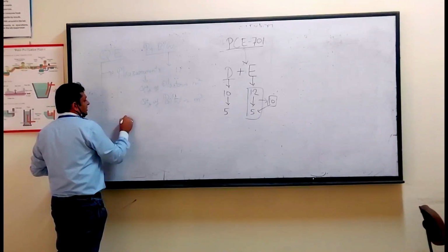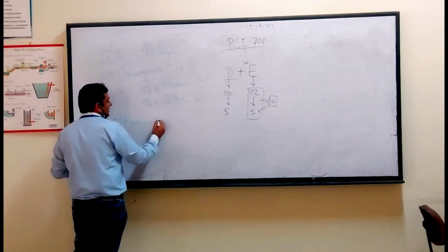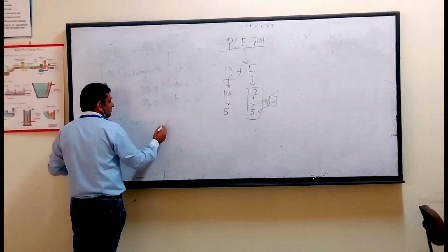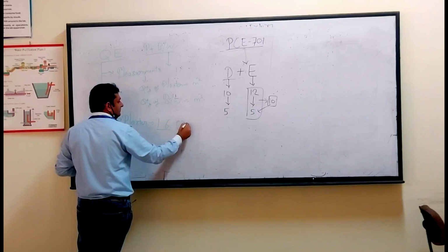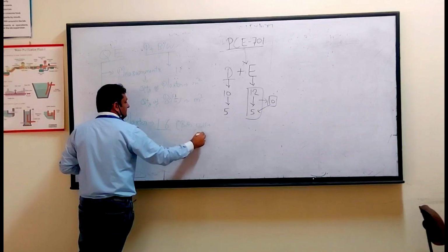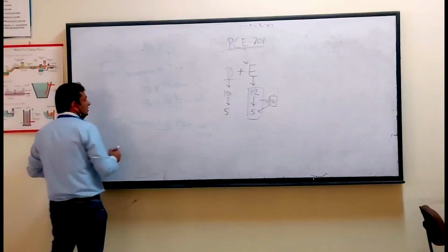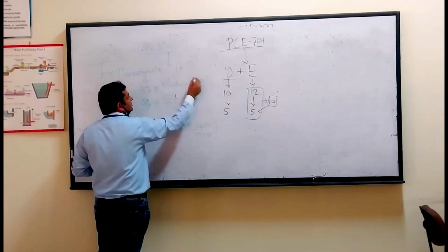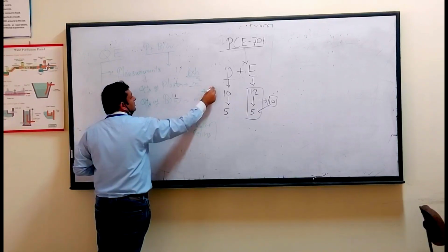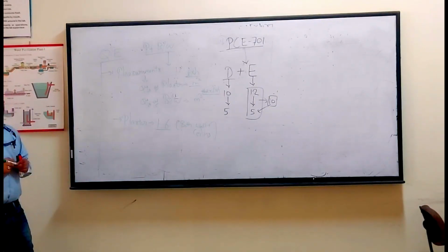Now, since plaster comes in different grades and proportions, the assumption we are taking is a plaster ratio of 1:6, for both ceiling and wall. This will be your plaster proportion. For your area estimates, you require length into height, and for brickwork, thickness into length into height. This will give you the quantity estimates of plaster and brickwork.